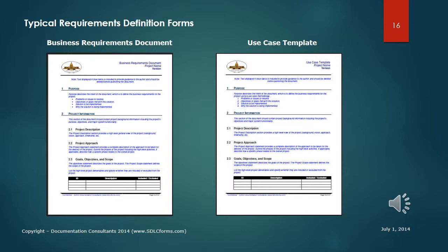The business requirements are the key to a successful project. If adequate resources and time are not allocated to this step, a disaster can easily befall you when testing occurs downstream. Within this document, you will capture the project description, goals, stakeholders, assumptions and dependencies, risks, high-level estimated costs, explanation of the current versus future state, system interfaces, and infrastructure requirements.